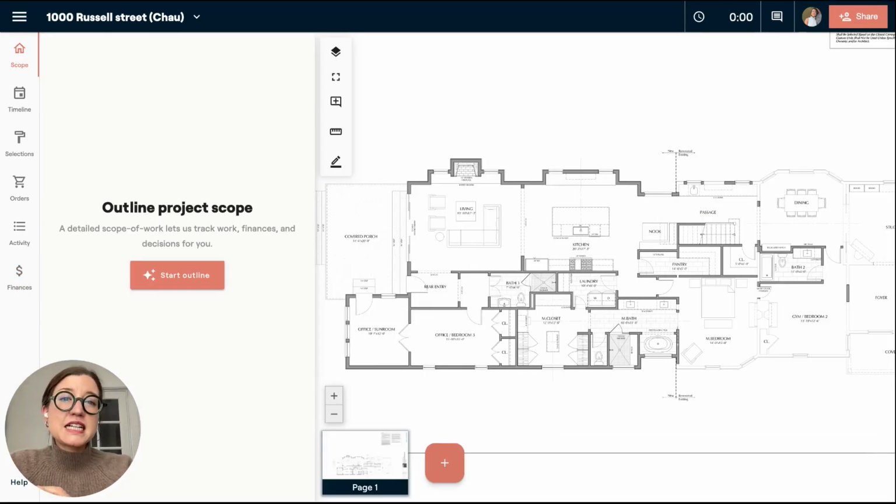Next step of this project is actually going to be to build out the actual estimate or proposal. So you've told them in your agreement that you are going to give them something. You've probably given them a ballpark number, but now it's time to look at the floor plans and actually figure out what needs to go into this house. Now we haven't signed a construction agreement yet. This is just us speccing this out, providing an estimate, building out a schedule, and then putting in some selections. Eventually, we'll get to the point where we sign a construction agreement if they want to move forward.